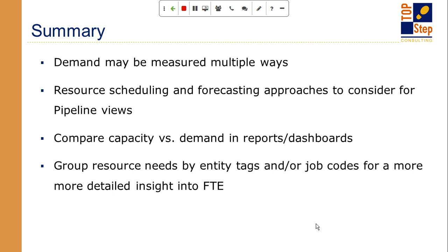I do encourage, as you're setting up demand reports and forecast reports, that you consider putting reports together that show capacity versus demand, like that graph that has the capacity versus demand I showed here, or even that FTE report where I have quantity on staff versus what I've scheduled out, because that gives you a better view at a point in time and as a forecast perspective to see when will you start falling short on headcount availability and when would you need to start hiring so that you can get that person in and productive as soon as possible in the system.